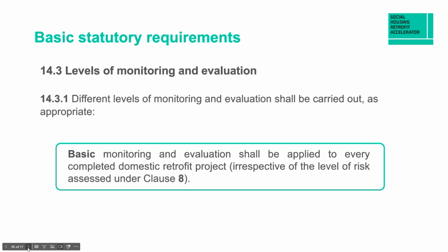So under the PAS, there are a couple of levels of monitoring. There's a statutory minimum. So the basic monitoring and evaluation shall be applied to every completed domestic retrofit project, irrespective of the level of risk assessed under clause 8. So this normally applies to having a survey with the resident to see how they've taken on board the retrofit projects, to see whether they understand it and to see how they feel about it. That's your basic minimum level, really.